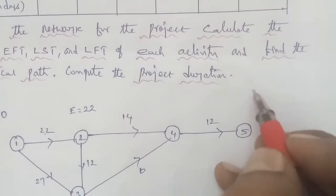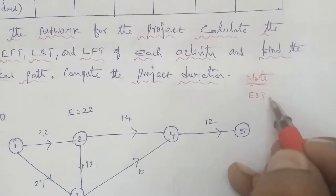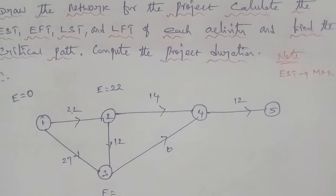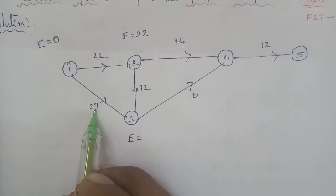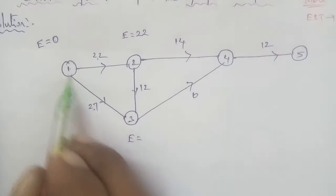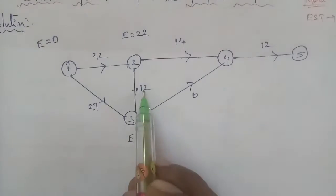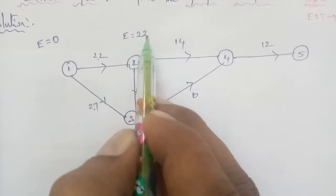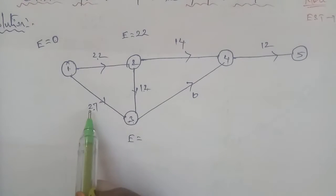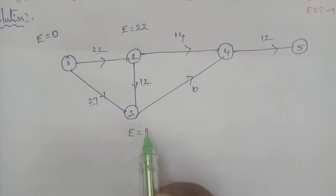Now calculating the earliest starting time for Node 3. We check the maximum value from all incoming paths. Path 1 to 3: 0 plus 27 equals 27. Path 2 to 3: 22 plus 12 equals 34. We take the maximum value, which is 34. So the earliest time at Node 3 is 34.